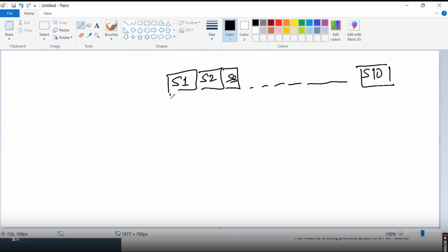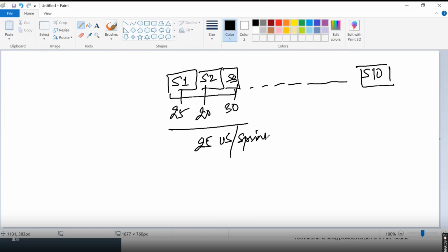So from my backlog, I pulled the work and we've done the user stories. In the first sprint we did say 25. This one we did 20. This one we did 30. So my average is 25 user stories per sprint. We're maintaining an average. Now, how many more sprints are left to us? We have got 7 more sprints left to complete.